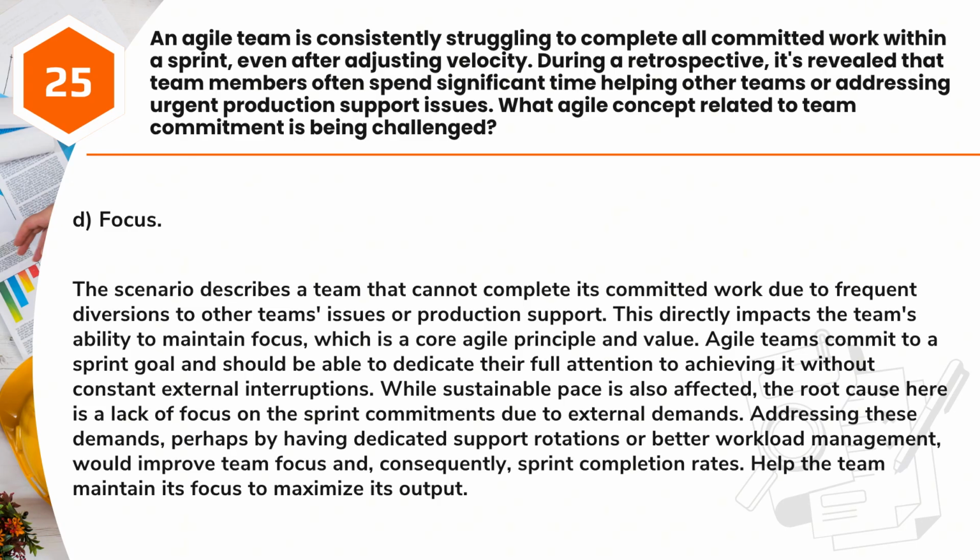constant external interruptions. While sustainable pace is also affected, the root cause here is a lack of focus on the sprint commitments due to external demands. Addressing these demands, perhaps by having dedicated support rotations or better workload management, would improve team focus and, consequently, sprint completion rates. Help the team maintain its focus to maximize its output.